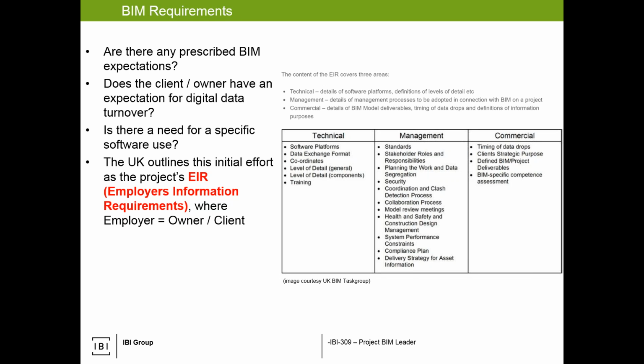And if we know that up front, then we're not worried about it at the back end, where all of a sudden we're getting questions: should we turn it over, did we plan for it, did we budget it, is there a risk associated? No, we're planning that up front. If the client wants it, right away, is there a risk to turning it over? Do we want to? Maybe we're going to have a heavily advanced project and we don't want to give them our Revit, maybe we just want to give them an IFC file. All of those can be put upfront, planned for, prior to any modeling, prior to any effort, getting that understanding.